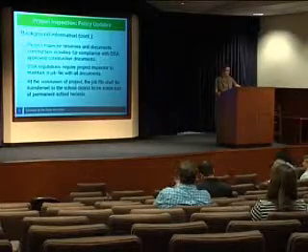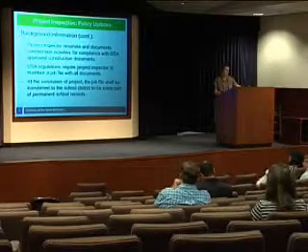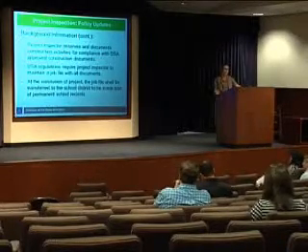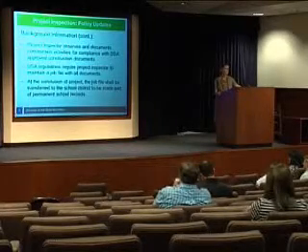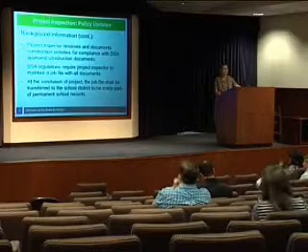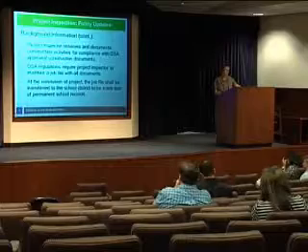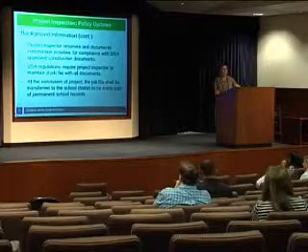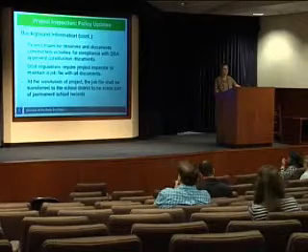So the role of the project inspector is that he or she observes and documents construction activities. The project inspector does not have a role of directing construction, of telling the contractor what to do, or telling the architect what to do. But the project inspector observes and documents activities. And a lot of the documents that are generated by a project inspector may trigger the contractor or architect to make changes.